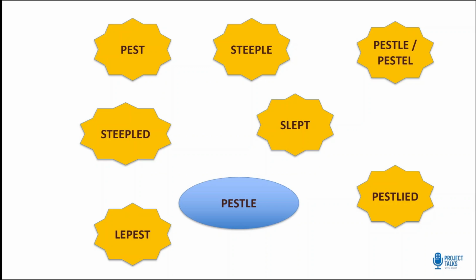So, as a project manager, the key takeaway isn't just knowing what PESTLE stands for, it is knowing which version best fits your project context. If you're launching a simple app in one market, the classic PESTLE works. But if ethics or demographics play a big role, then STEEPLED or STEEPLE are more relevant. Similarly, if you're expanding globally, PESTLED gives us a sharper edge. The framework itself is flexible. The real skill lies in choosing the right lens so we can anticipate challenges and align our project strategy with the bigger environment.